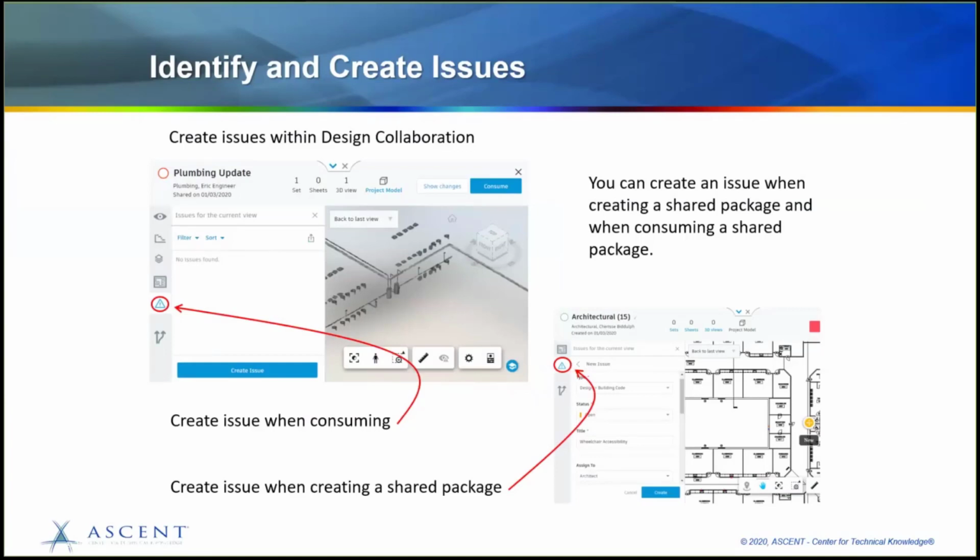You can add as much detail as possible so you are communicating to the fullest, like assigning it to an entire team, role, or person. You can specify a due date when the issue needs to be addressed, give location details. You can even change the owner. So if I'm creating an issue in a model that I don't necessarily want to be in charge of, I can assign it to my team lead or someone else to be responsible to verify that it gets addressed.